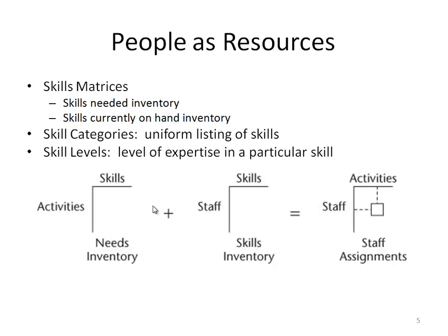The set of available skills will be documented in a matrix. In addition, we can define the set of required skills that are not available within the organization, and that will be used in identifying the contractors needed to fill the skills that are not available in the organization.